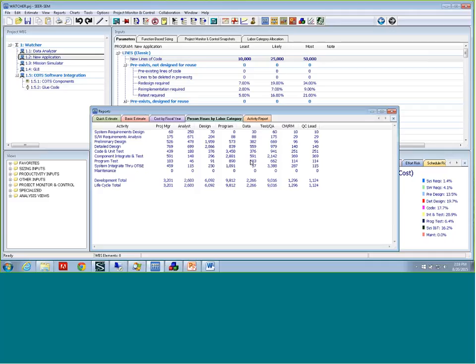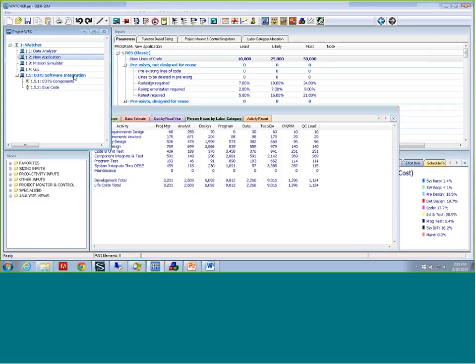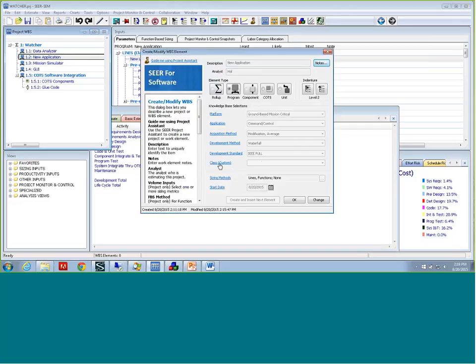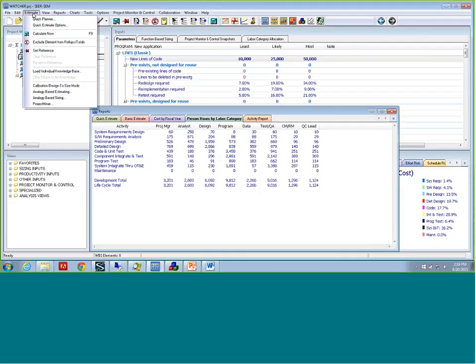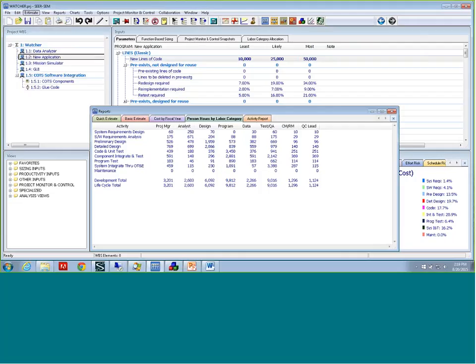When you have that data, we have other applications that help with that process, so it can go into a historical database, so all your completed projects are in one area, and then you do the calibration process. And in the end, what happens is you can load your own knowledge base. That's what the class 1 is designated for. That's one way of taking advantage of your historical info. But we also have what we call, and now sorry, yes?